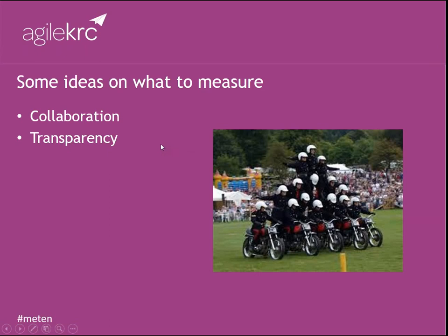Another major Agile concept is transparency, putting things on the wall, openness, trust. How on earth do you measure that? Again, have a go, try something. So, for example, literally marking on a scale from 0 to 10, very subjective, how transparent do we think we are on the project? Keep a running total of it and see how it goes.